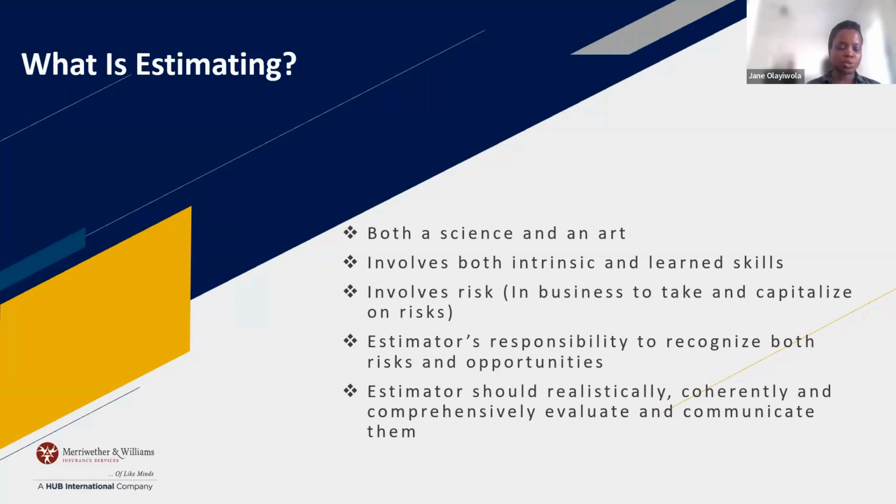Things that you might want to do include going to job walks, right? Reaching out to subcontractors for their expertise, and sending in RFIs, either to your client or to the GC or to the engineers, the design team, as necessary, just to make sure you have as much clarity in the very beginning as you can, knowing that, of course, there will be some surprises over the course of the project, but planning to be better able to respond to those surprises as they come up.